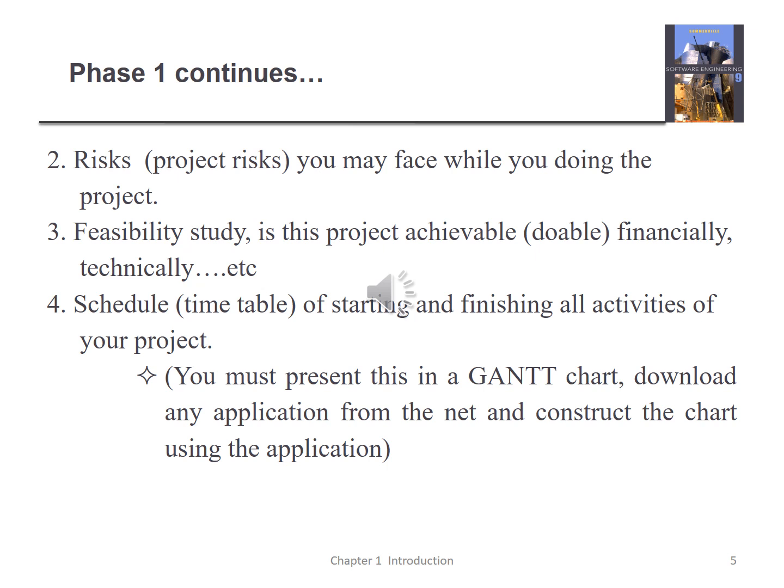Then we have to put a timetable together after doing some rough estimation for the tasks we are going to do, and the dependencies between these tasks: which task is done first and which tasks are done concurrently, etc. And we have to build the Gantt chart. The way it's supposed to be done, we go to the internet and download one. There are many applications that help you construct a Gantt chart.